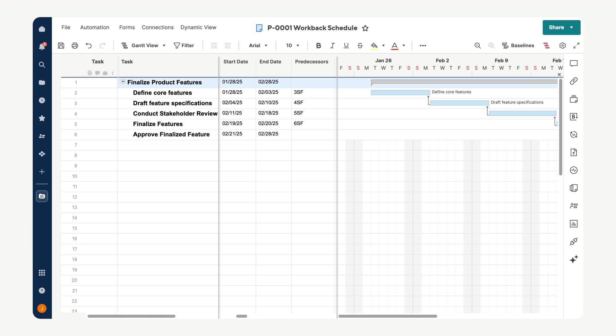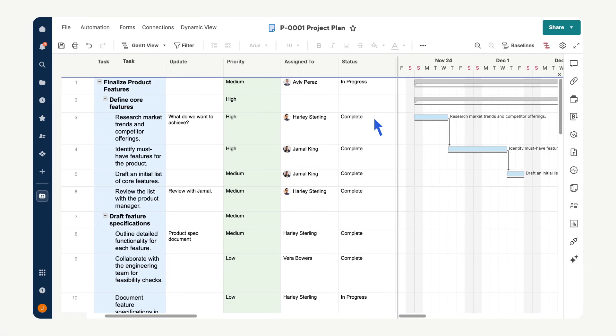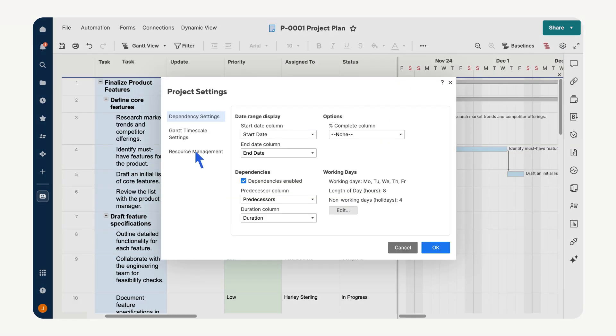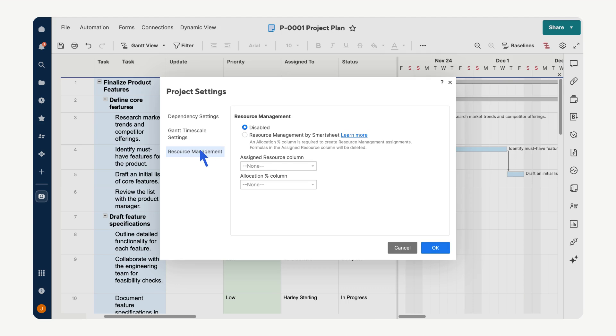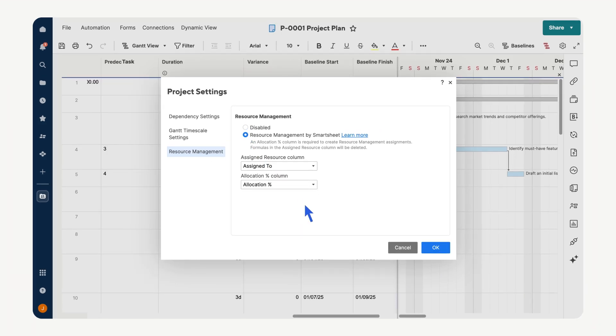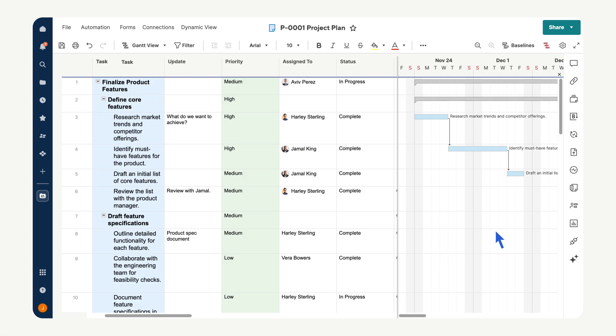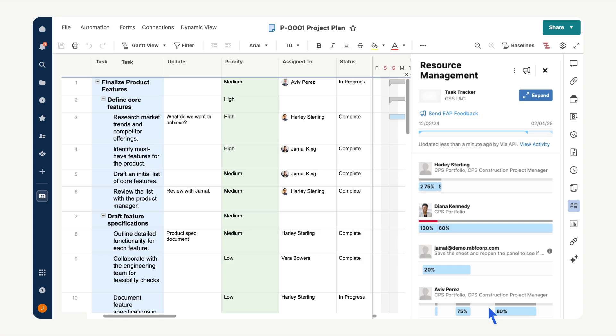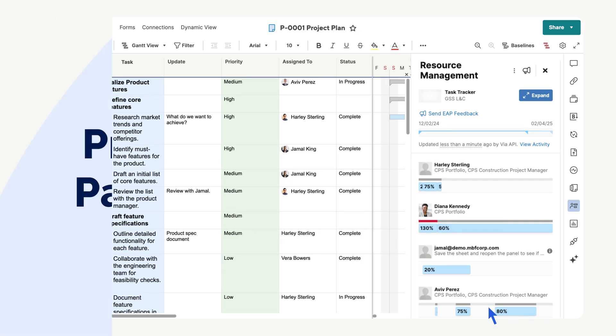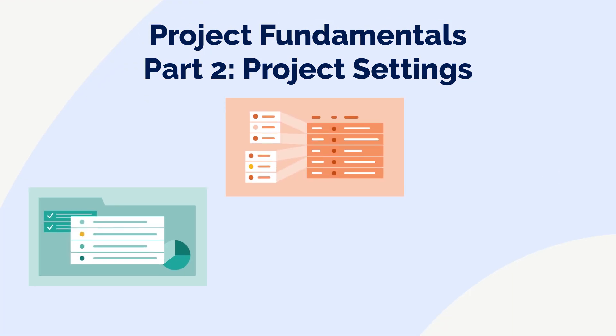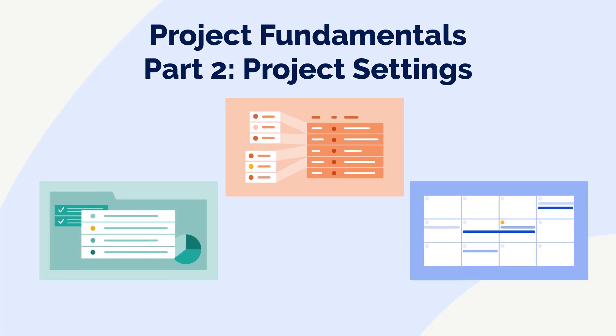Resource management ensures your team is working efficiently without overloading individuals. Assign tasks to team members in the assign to column, then open project settings. Select resource management and ensure it's not disabled. Select an allocation percent column and then okay. Open resource management from the toolbar and select track workload to access the heat map, which shows how tasks are distributed across your team. These tools ensure your project stays organized, adaptable, and on schedule.